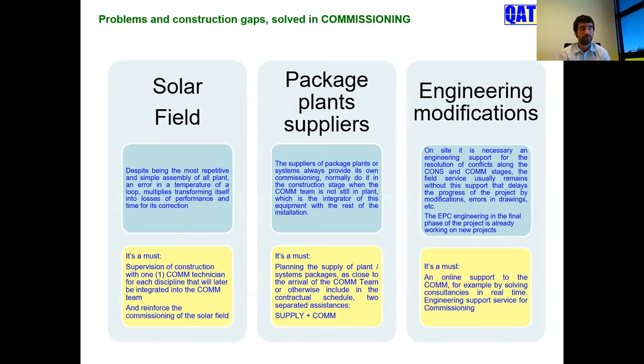For example, we did the commissioning of Khi Solar One in South Africa, only the commissioning. We didn't give any support to the construction. We arrived at the plant only for the commissioning. In spite of the problems in Khi, because I know there were some problems with the tower, the real time for the commissioning was 14 months.